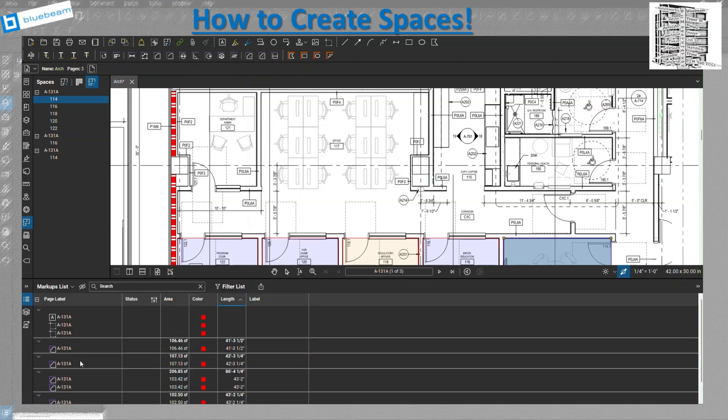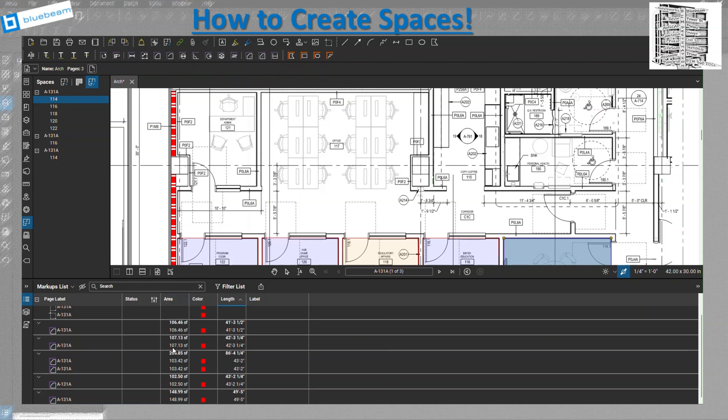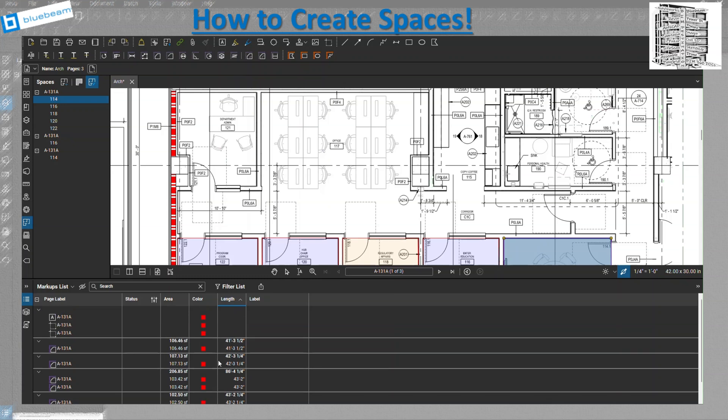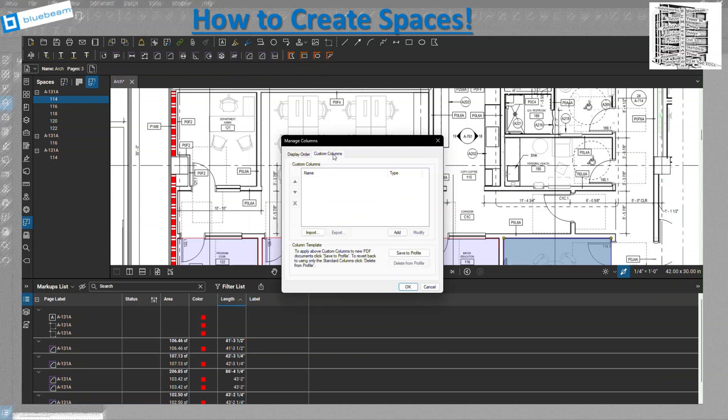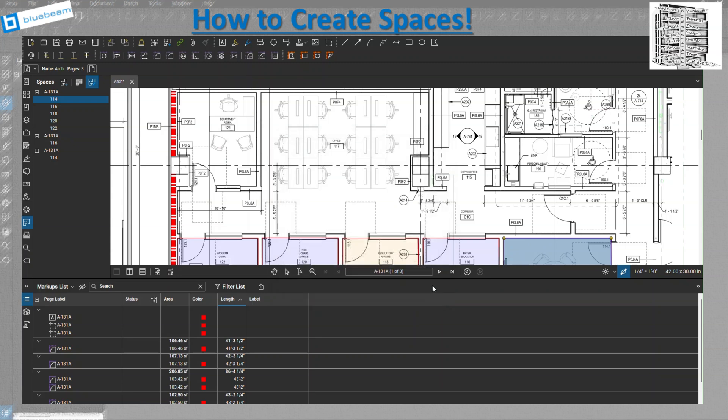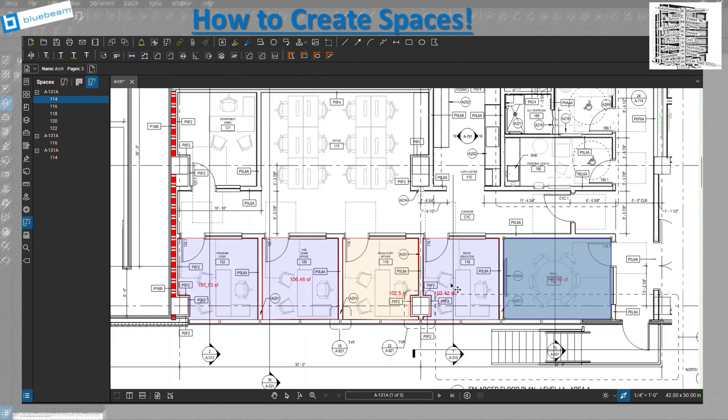And the last thing is you can get all of those markups under your markup list, and this is a great tool because you name the rooms, everybody knows what room, what the problem is. And you can adjust all of these columns and customize it and basically add more info to this with the area. If there is a concrete footing that you want to do, you can put the volume on it. And also you can date it, change the status, change the color for every single one. And if you need any customized column you can add it over here. So I think naming this space is going to be the first step to create a very good punch list for your project.